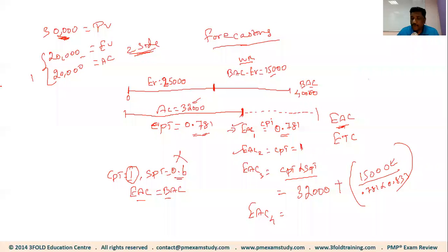Fair enough. So the fourth assumption is finding EAC where the future work, or the work remaining, is no longer valid. Or in other words, the work remaining will be completely re-estimated. So in this case, the formula is pretty straightforward.